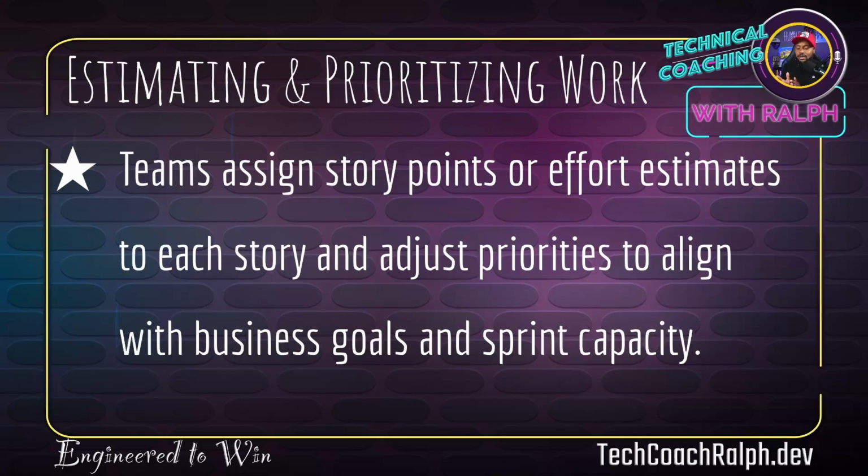And based on the estimates, once we go into sprint planning, we see, okay, what's our velocity, what's our capacity, and now we put the points that are going to be close to that, or maybe sometimes a little bit above it. But in the story refinement, that's where we are actually pointing our stories, estimating the level of effort, so that we can see, okay, this is the most important story. It's 5 points, 8 points, and we're going to take these 3 stories, we're going to put into the sprint, and that's what we're going to be working on. But we need to be able to estimate them during the story refinement meeting.